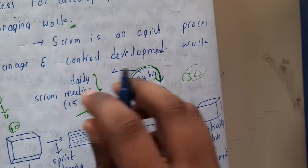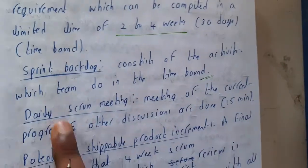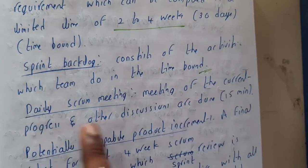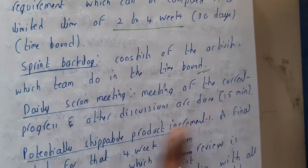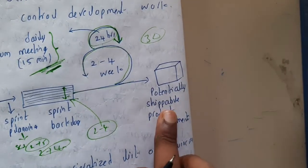That is the reason why the meetings are done to verify everything. Daily scrum meetings of the current progress and other discussions are done for around 15 minutes, and at the end you will be getting the potentially shippable product increment.